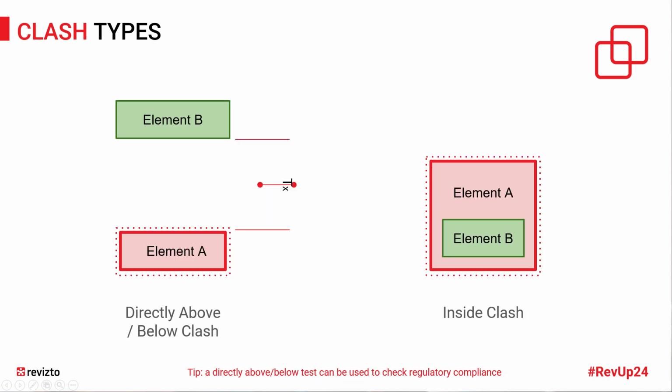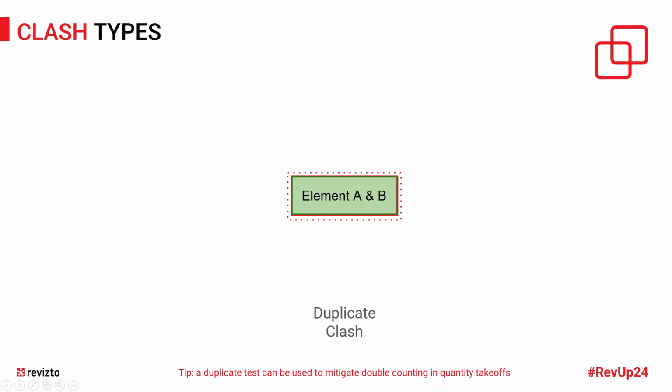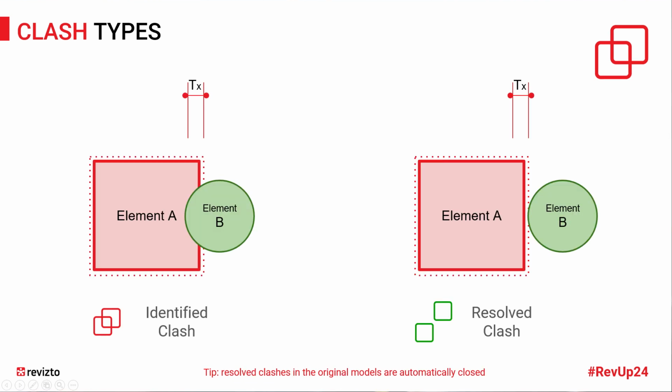You can see we also have directly above and below as far as clearances, so now you don't have to model a ADA headroom clearance to run the accessibility clearances over your drive aisles, so that's a really good one. It's called directly above right here. And then there's tolerance clashes that you can set up as well. And when we get to the fire round, I'll show you some use cases of how to leverage some of these.